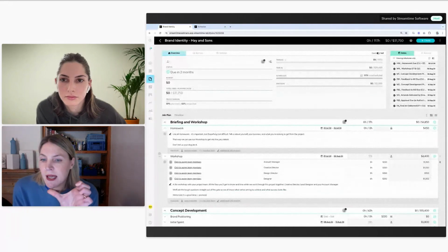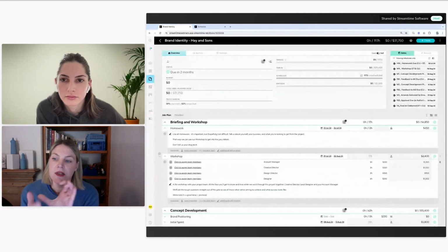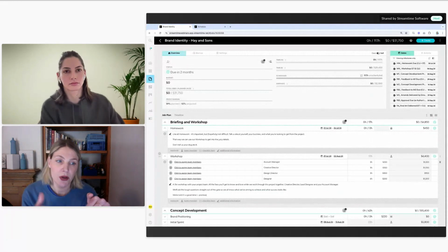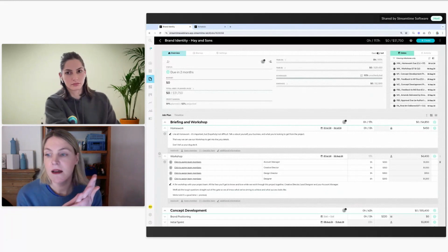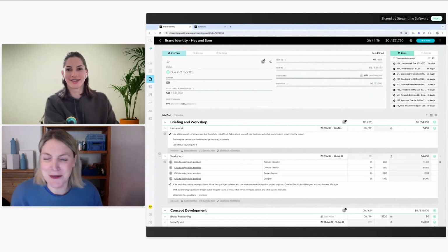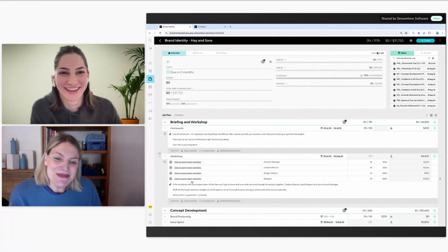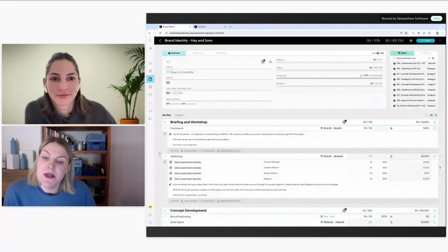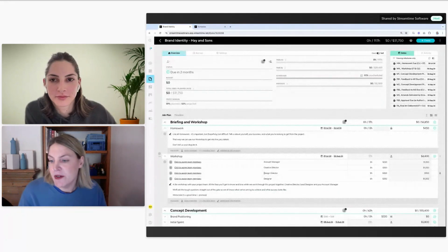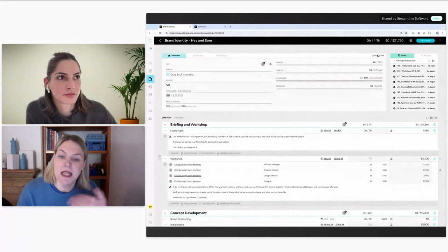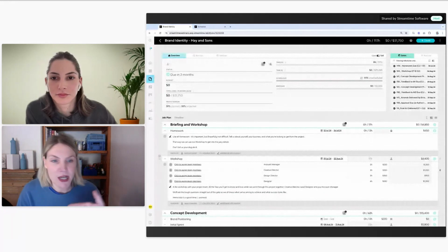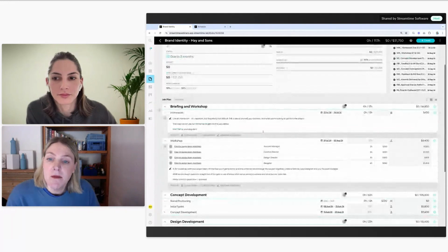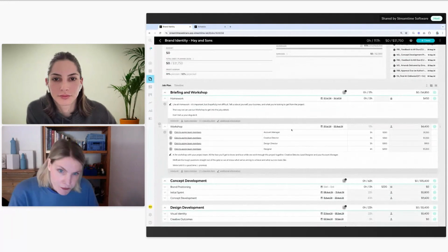So one important distinction is that in Streamtime, you'll usually set your items up based on a deliverable or a piece of work that you're delivering to your client, rather than the roles. So some people get stuck on that when they're first starting with Streamtime, that they think that perhaps their items should be account management, creative direction, etc., etc. Sometimes it is, but in most cases, we're going to build out based on our deliverables.